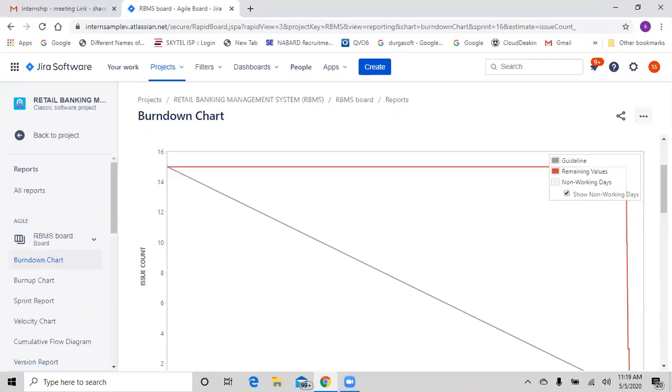But as a fresher, how do you know the story point is an ideal value and not under optimization level? Being a fresher, you give some story point values as a developer, and that can be overestimated or underestimated sometimes. That's the reason you are along with the team. You are not giving your story points individually, right? Here we gave individual values, but I told you in the workshop, even developers together will give their values and discuss why they are giving them. If someone has inequalities, other people will make them understand and justify their points, right or wrong?